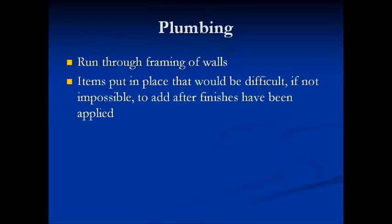For plumbing, your pipes at times would need to run through the framing of the walls. During this phase, you would need to be putting items in place that would be difficult, if not impossible, to add after the finishes have been applied. Think of built-in bathtubs — those are extremely hard to get into a house after the house has already been built.